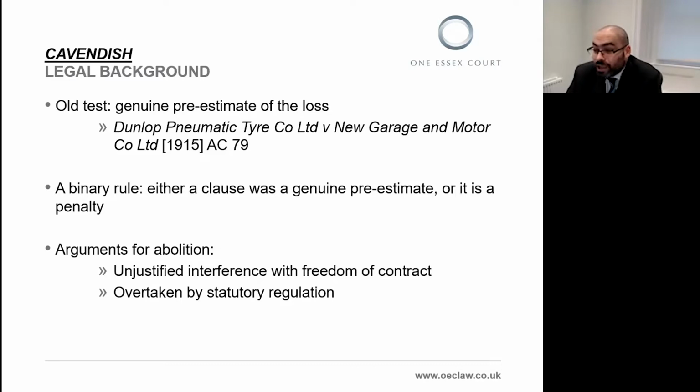It's definitely what I learnt, and it came from the judgments of Lord Dunedin in Dunlop Pneumatic Tyre and New Garage and Motor Co. In other words, if the sum contained in the clause was a good faith estimate of the loss that the innocent party would likely suffer if the other party was in breach, the clause would not be considered a penalty. And following Dunlop, this was the test that was consistently applied by the courts. Either a clause was a genuine pre-estimate of loss or it was an unenforceable penalty.